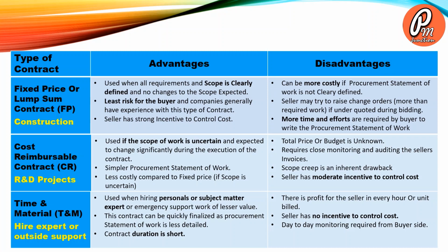Time and material contract is generally used to hire experts or outside support. Used when hiring personnel or subject matter experts or emergency support work of lesser value. This contract can be quickly finalized as the procurement statement of work is less detailed. Contract duration is generally short.